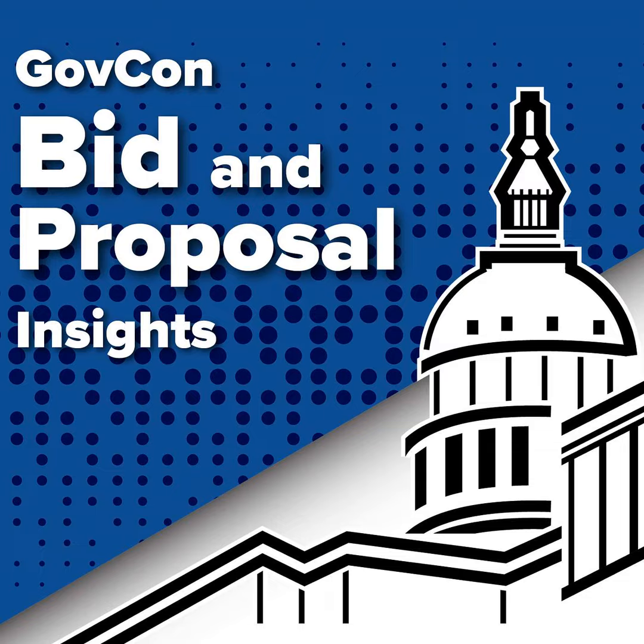And here's something really important for anyone listening who might be interested in FAA work. They don't use the standard rule book, do they? That is so key. Unlike pretty much every other federal agency bound by the Federal Acquisition Regulation, the FAA uses its own system. It's called the Acquisition Management System, or AMS. And that matters because it gives the FAA a lot more flexibility. The processes for selecting sources, handling protests, the contract terms themselves, they can be quite different under AMS. You absolutely have to understand AMS if you want to bid successfully. It's non-negotiable homework. Good point.